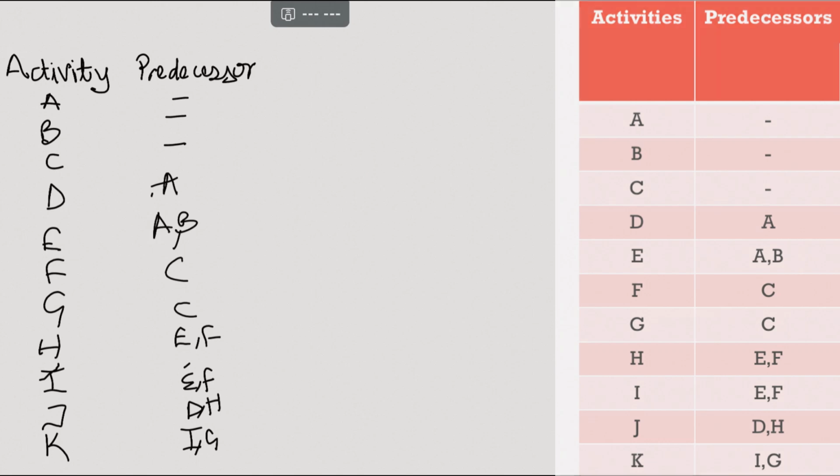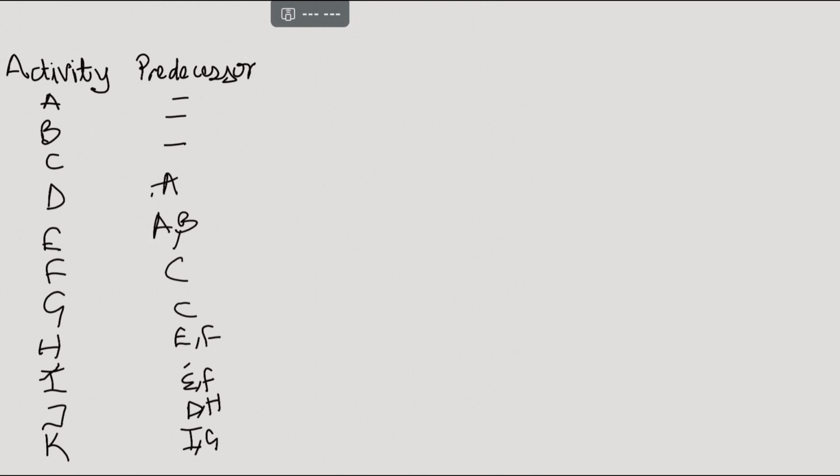From the question, we are asked to find the critical paths and to draw the network diagram. But to draw the network diagram, we need the mean, because the values we get from the mean will serve as our estimated activity durations, since we have three time estimates. We want to get just one actual figure. So we'll start by solving the mean. I'll just solve for three activities, then you can solve for the rest and confirm your values with the image displayed on the screen.